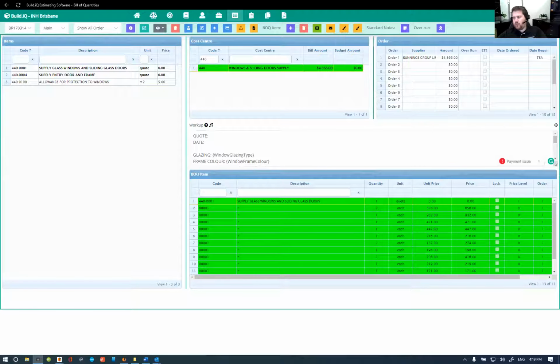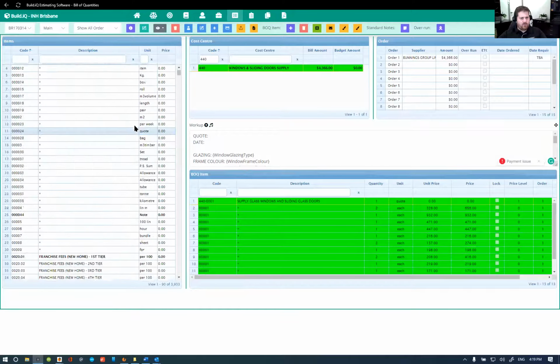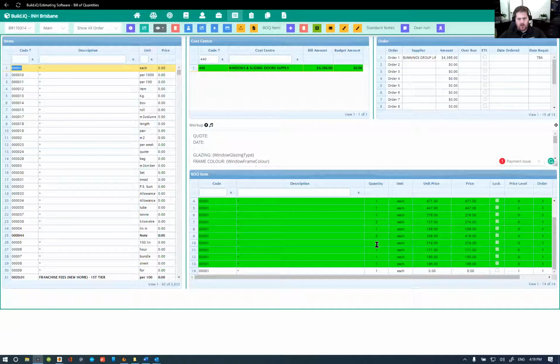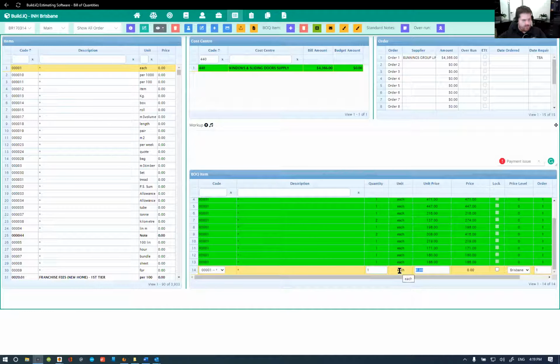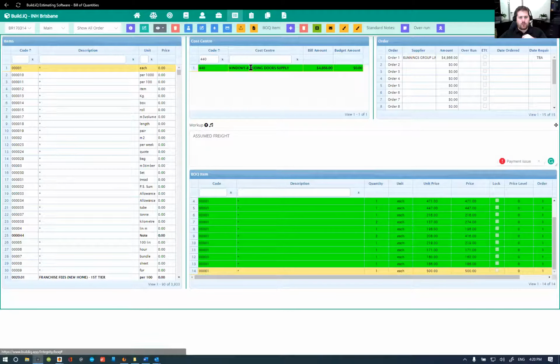Now, I think it's worthwhile noting that they have to add freight on top of this, and it's just a general indication. And I think if I allowed about 500 for freight, probably going to be pretty representative for the metropolitan area.